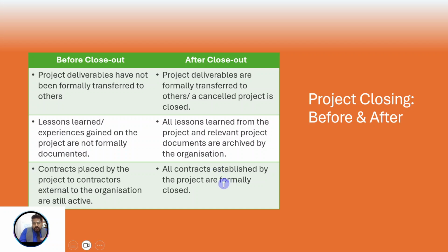So in closure, what you do is a sign off, you attach a sign off confirmation by the customer, you attach lessons learned, you also attach the best practices. What are lessons learned? Anything that you have learned in the project that you could have done better, you involve that.